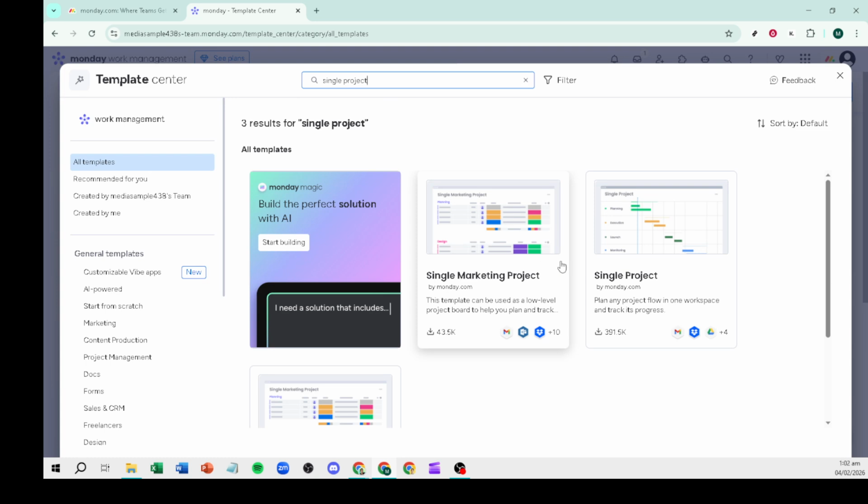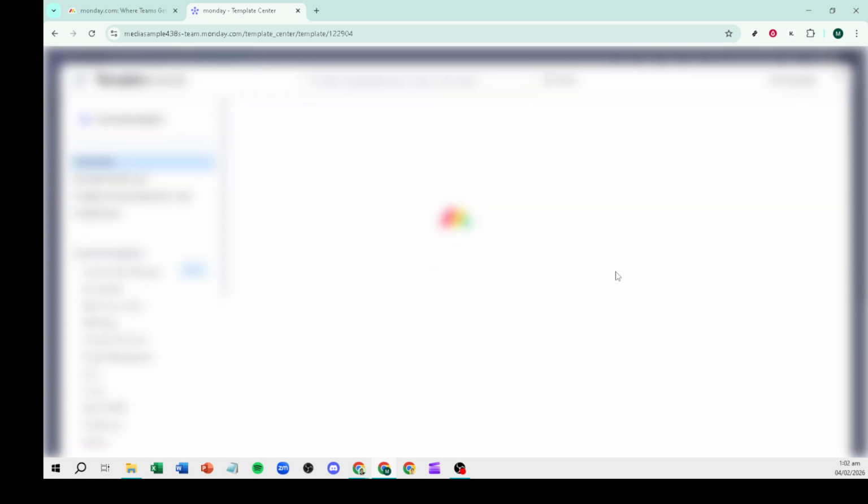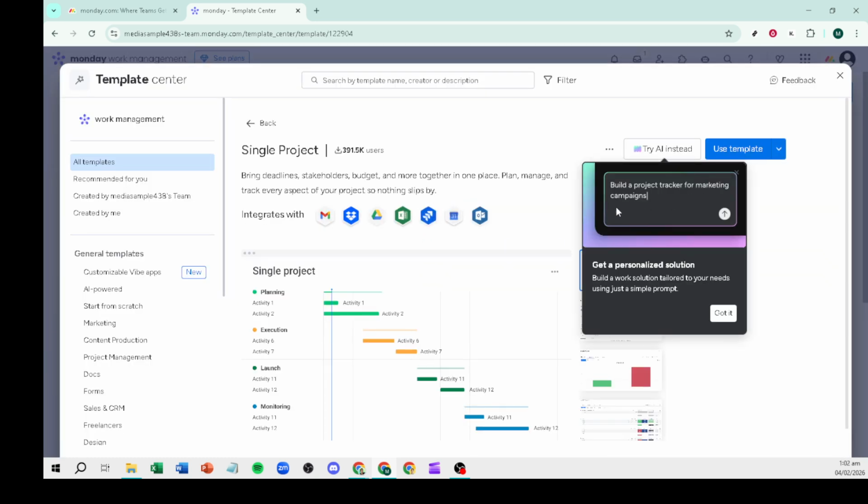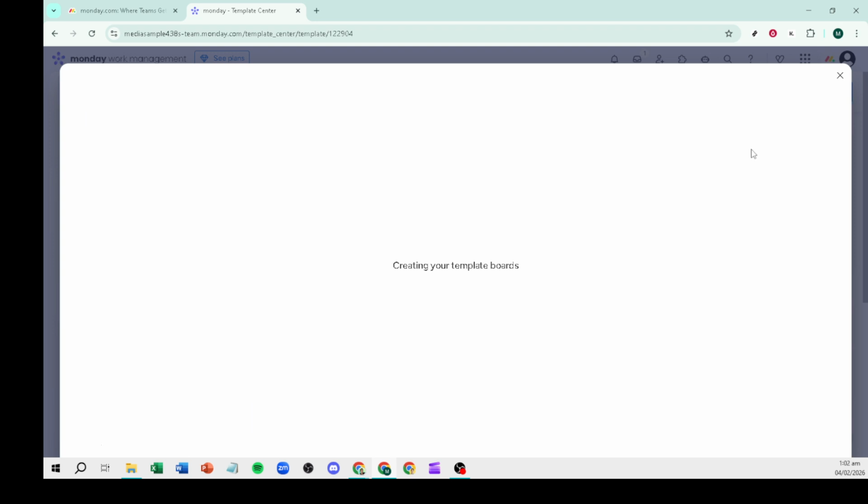Begin by organizing your board into groups that represent the phases of your project. Common examples include initiation, planning, execution, and closeout, but use labels that match your workflow. Clear phase groups make it easy to see progress from start to finish and help stakeholders understand where everything sits at a glance.